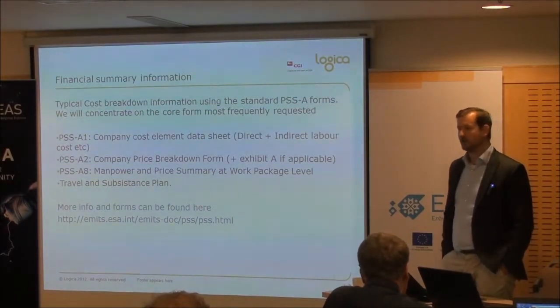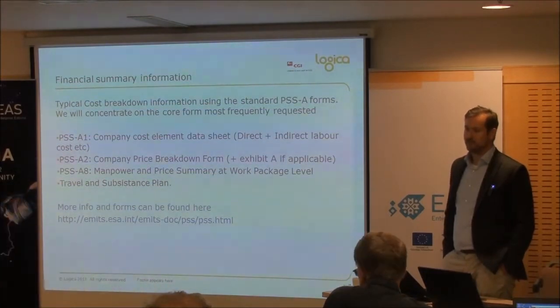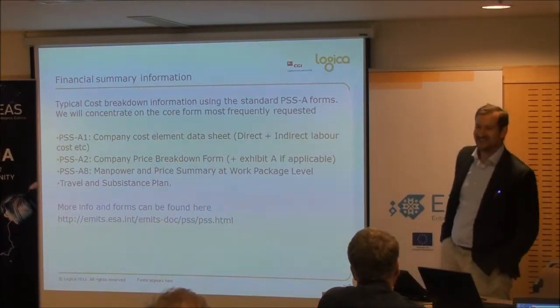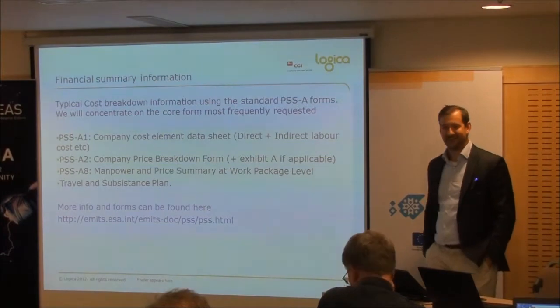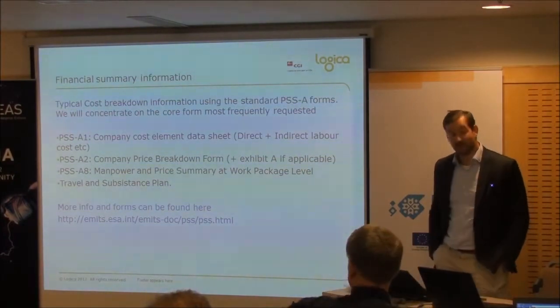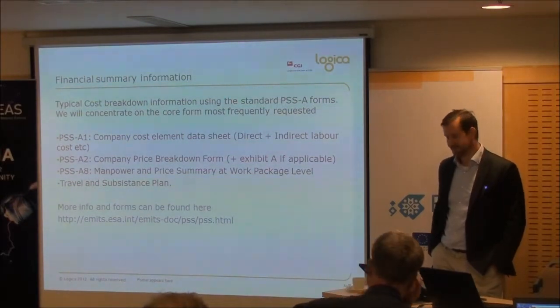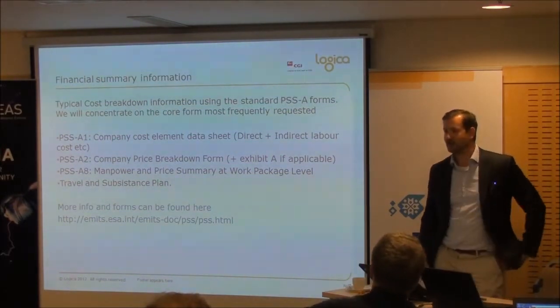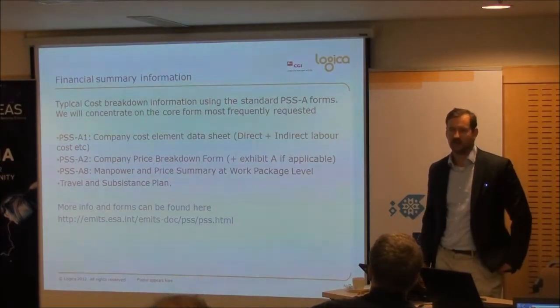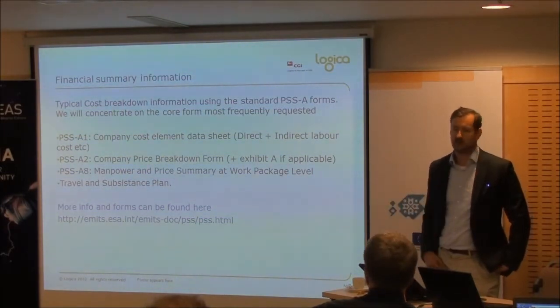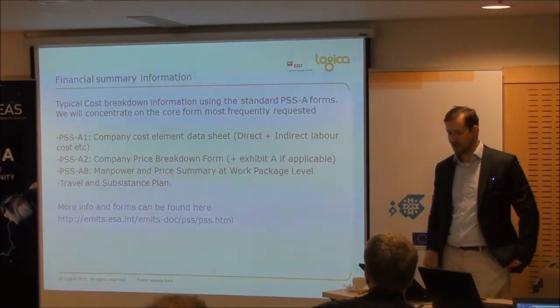Bear in mind, these are auditable. So if you go and put a 200% overhead charge, at some point they will quiz why you've got such a large overhead over your labour. And if you don't have a good justifiable reason for it, then I'd expect you to do something about it. So understand what that is. I guess most of you will be in businesses already, so you already have some way of determining what overhead pays for: the management and facilities and all the rest of it, the indirect part.